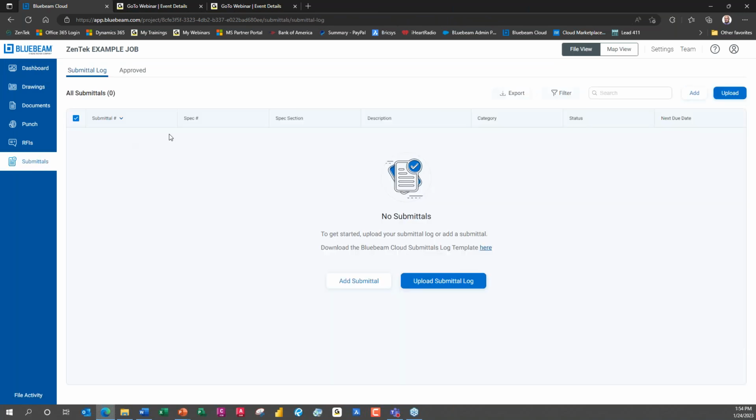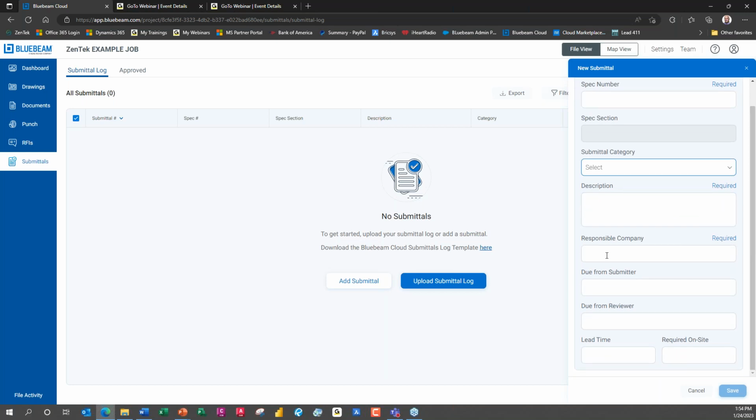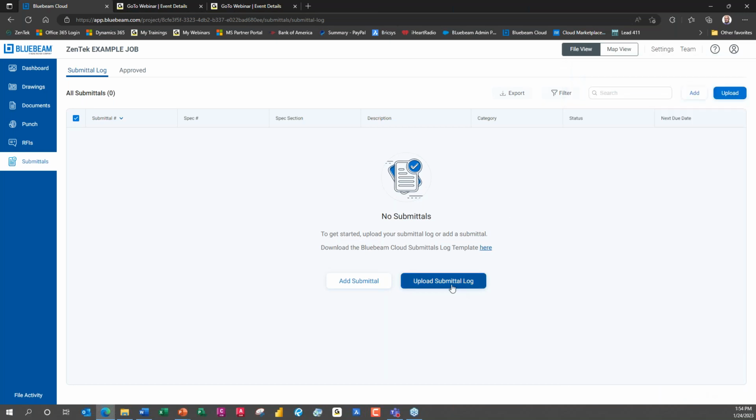here with submittals, right? I can go in here and I can add, if you're submitting, different types of submittals. I can upload submittals, which I'm going to do in a minute. I'm going to upload a submittal log because it's a little bit easier and quicker, right? But to show you, you're just going in, filling out your spec number, spec section, right? What's the category that you're submitting for, right? Who's responsible? When is it due, right? How much lead time? When is it required on site? And you can even go out and you can build your own Excel template. And it gives you the format and everything in here. You can just download up here where it says export, right?